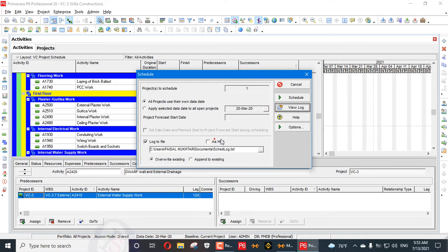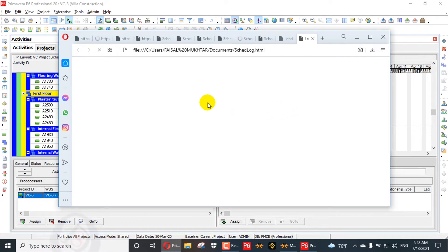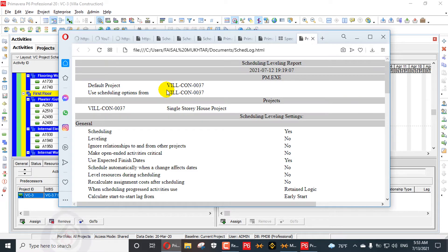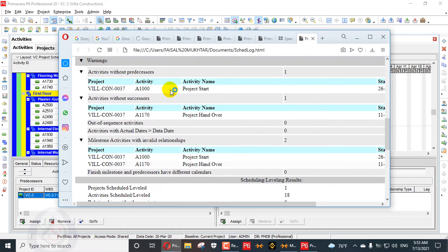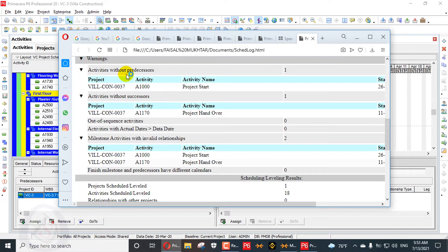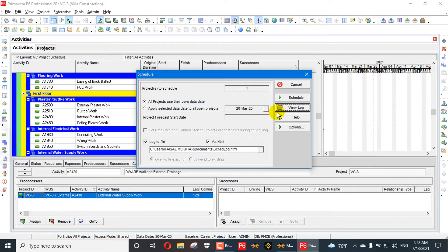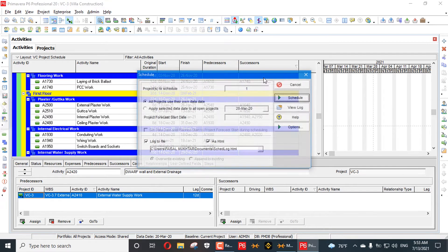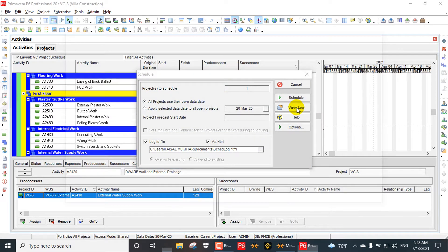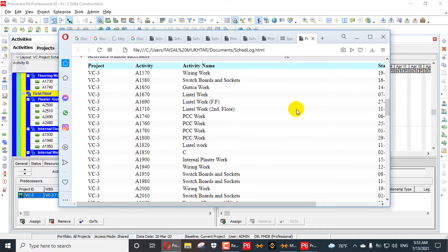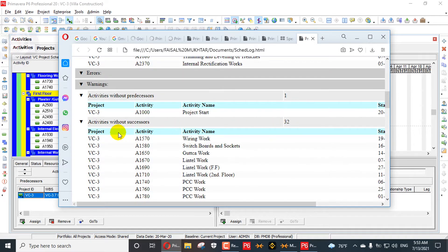If you want to generate HTML, you can select the HTML option here. We can view that log in a browser. Here you can see 'activity without predecessor' showing one activity. We will schedule the project first and then open it again. Now viewing as HTML, it will show 32 activities without predecessor.